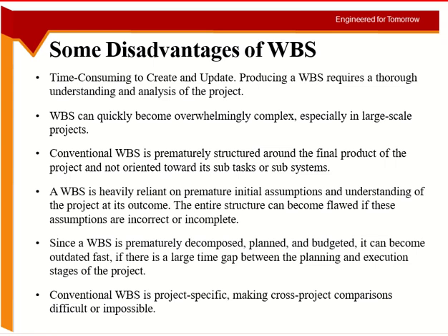I already gave you the example of ordering the shed. You order a lot of things when you are doing construction work, and you are assuming a lot of things: that this company will do this, that I will have the labor available on the site, that I need this much time for curing, that there will be no rain, and so on and so forth. So there are a lot of assumptions.